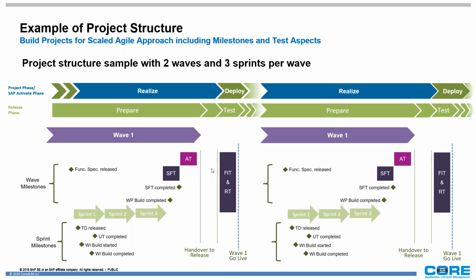If not, we're going to hand over everything to our release, which means this is where we'll jump in for this specific wave into a functional integration testing and a regression if required. And at this point, when we get to this test wave, this is where we kind of freeze everything and we do a testing for this particular wave in here.